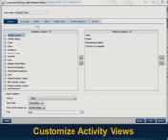As far as the difference between a global activity code versus an EPS activity code or a project-specific activity code, a global activity code is a code that's defined in the database, and all projects within the database have access to that same code. So activity owned by office is a global activity code because it's something that all projects within the database have access to. An EPS-specific activity code would be, if you remember when we took a look at the EPS structure, you can create a code that would only apply to the projects within that specific EPS node, right?